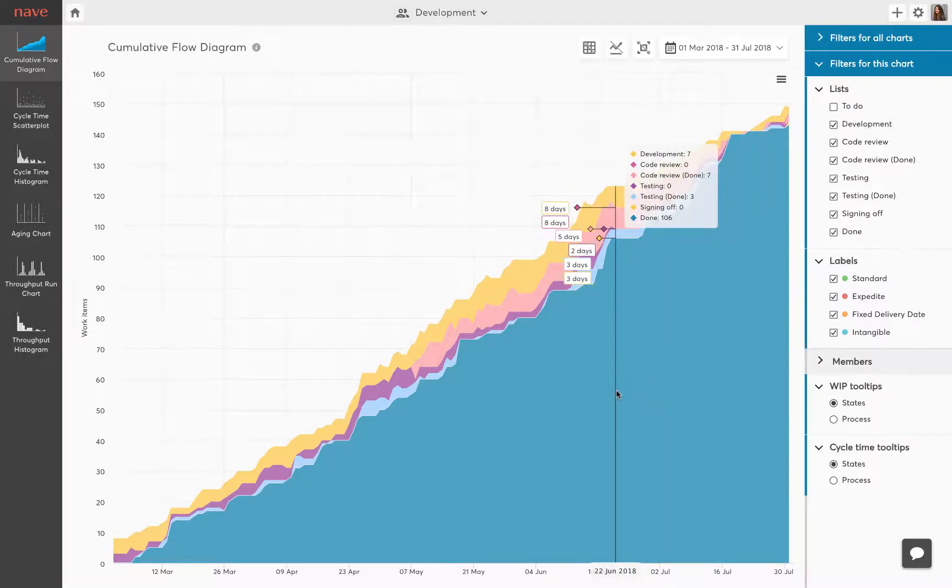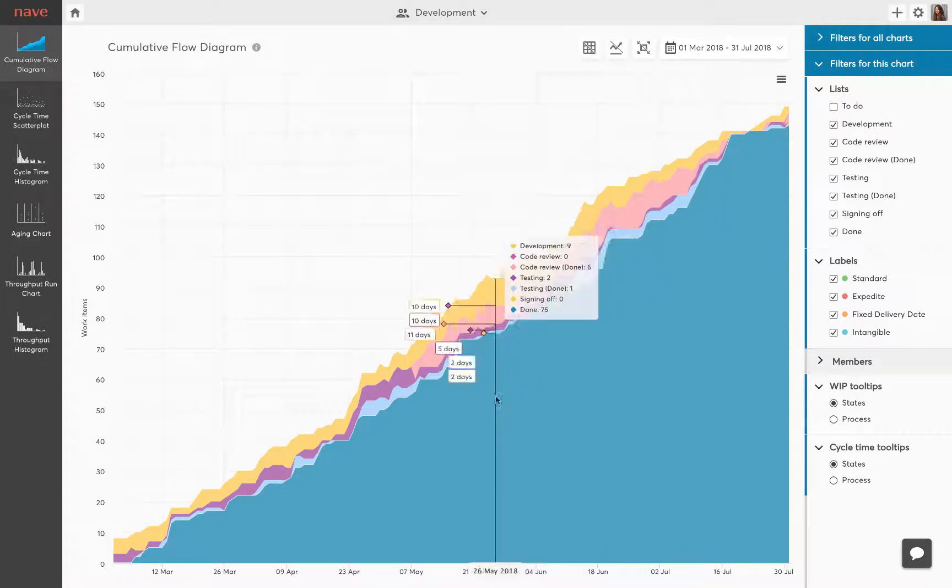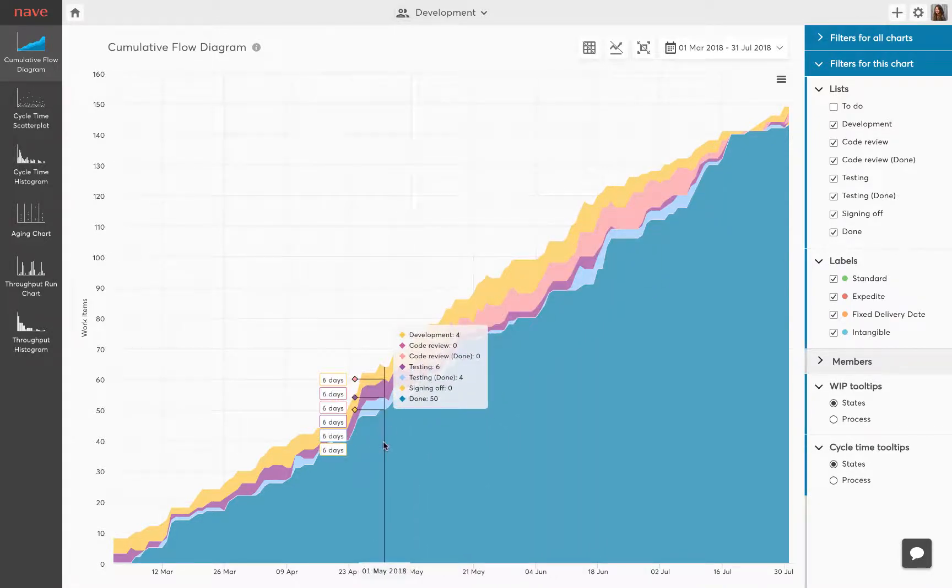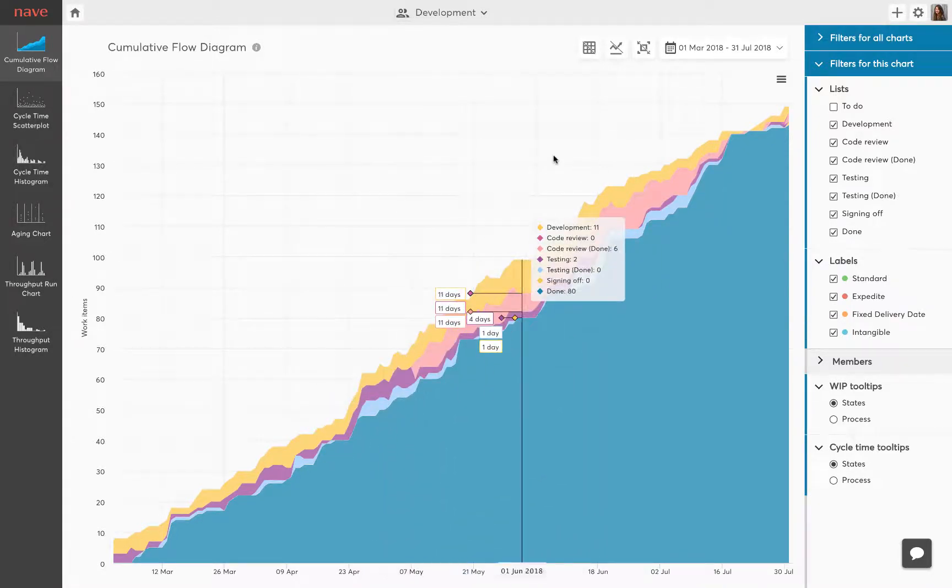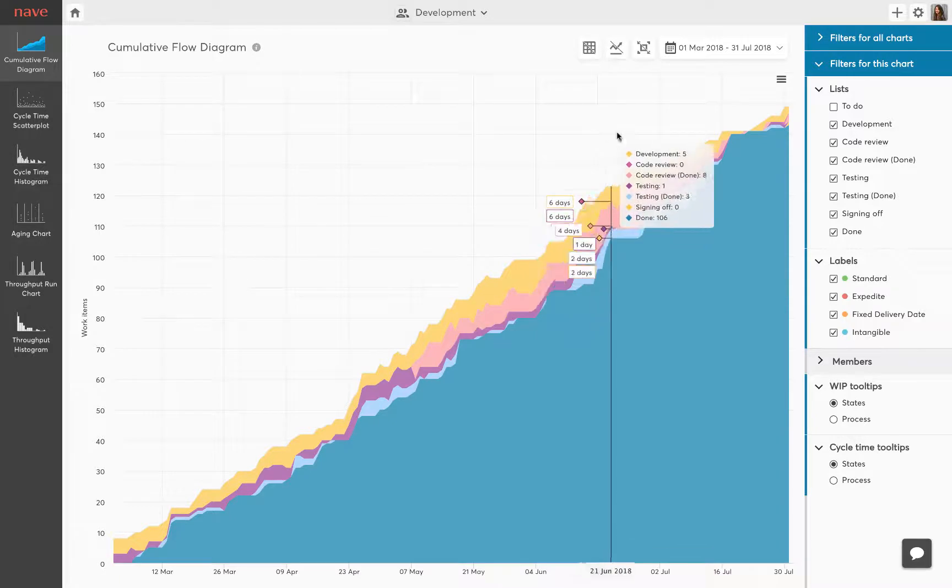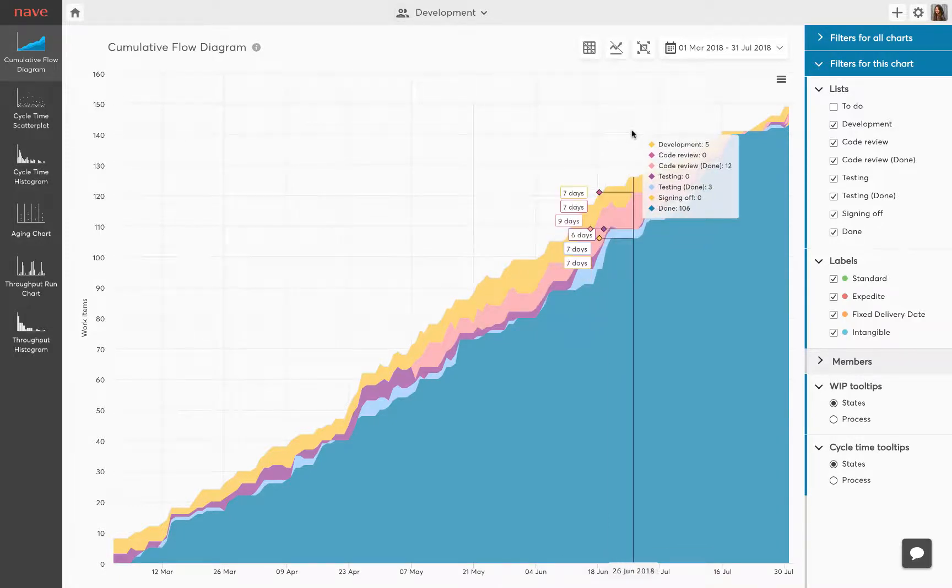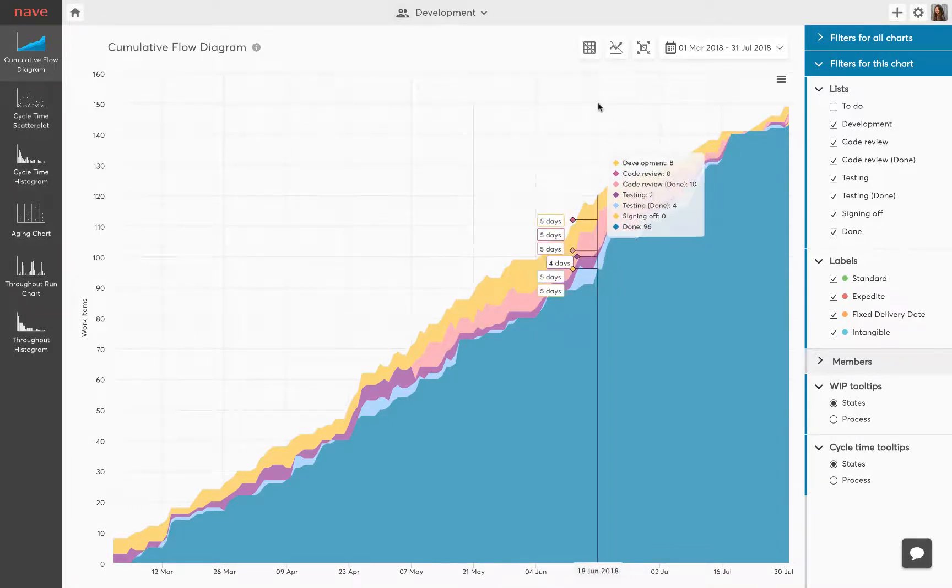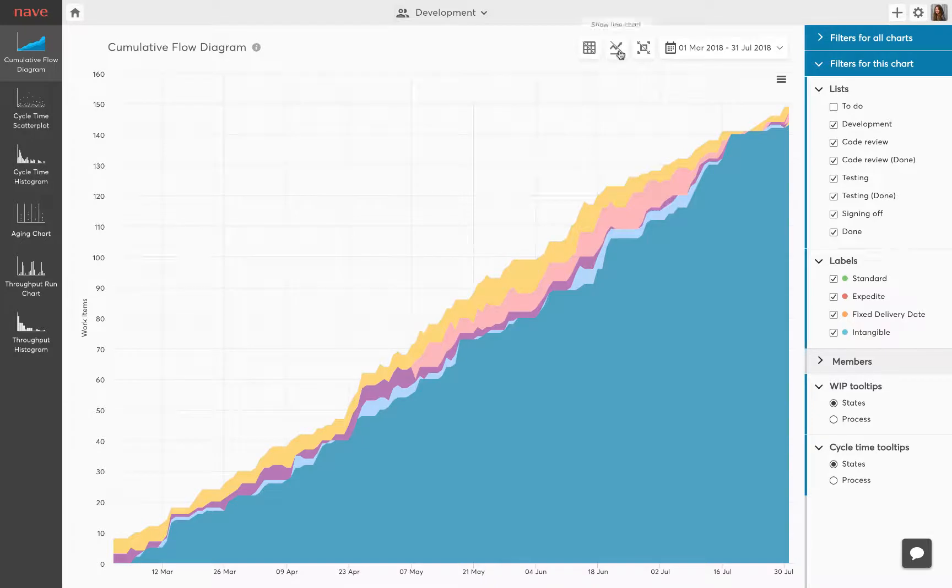Watch out for a flatter gradient in your done data. The slower it grows, the longer your delivery times. Always strive to keep the work in progress within the limit. This is the key to achieving a stable process.